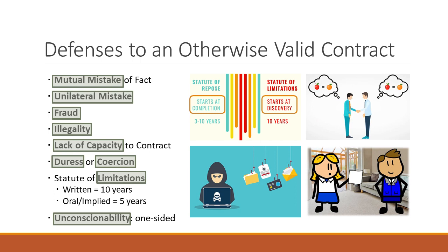But let's say, for example, this contractor builds the gym extension for your high school, and everything seems fine. You don't see any leaks. And then it's 9 years after the gym is opened, and it starts to leak. Because of the statute of repose, the second of those two bullets, you are in the state of Illinois within the time frame that you could still bring a claim. And when you figure that out in year nine, you have another 4 years after that to file that lawsuit or file an arbitration, whatever it might be.